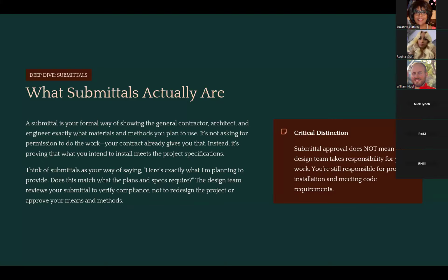So, say you're an electrician and you are providing a lighting package. So you're providing all the light fixtures for a large office building or whatever commercial building you're building, you're going to be buying all those light fixtures from a supply house. And most all, if not all, of the suppliers, as part of their process, will provide you with the product data of what they're buying. And they actually usually get that from the manufacturer. So it's a multi-chain thing that will start all the way at the manufacturer.